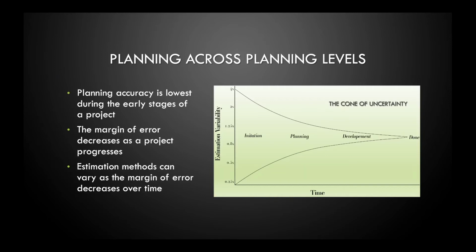The approach to estimation evolves over time during a project's lifespan. Just as story points allow for abstraction from absolute time units, ranges of story points can be abstracted to broader estimation units, such as t-shirt sizes.